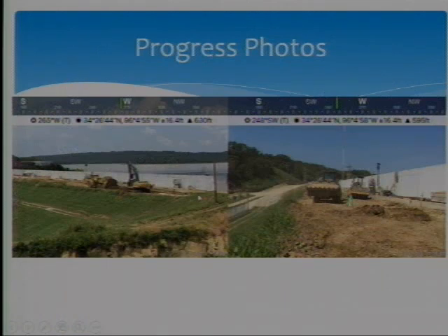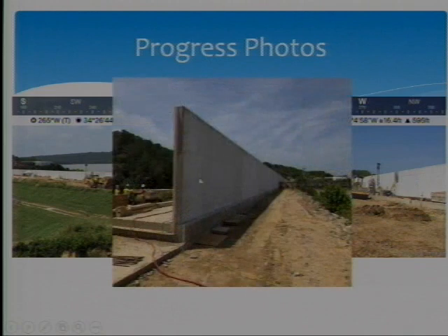Here on the top of the dam, the parapet wall has been taken away, and they're taking away the road that was on top of the dam as well, and starting to do some regrading up here. Here is a section of wall on the lake side of the dam, on top of the dam, that is being constructed. Here's another view of it right here. And this will allow us to raise the level of the dirt for the dam about 6.5, 7.5 feet, and not have to go further into the lake on either side whenever we add to the top of it.